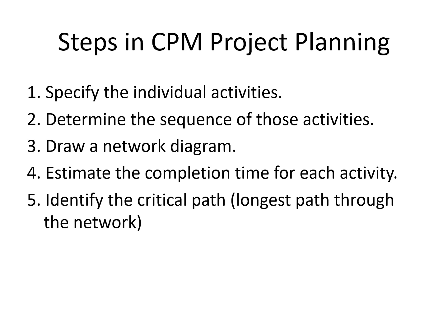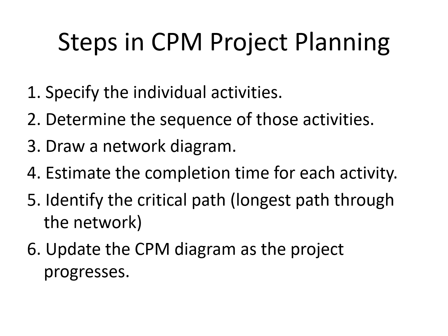The significance of the critical path is that the activities that lie on it cannot be delayed without delaying the project. Because of its impact on the entire project, critical path analysis is an important aspect of project planning. As the project progresses, the actual task completion times will be known and the network diagram can be updated to include this information. A new network critical path may emerge and structural changes may be made in the network if project requirements change.